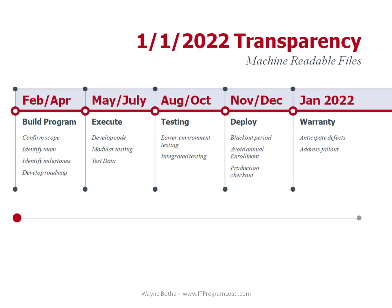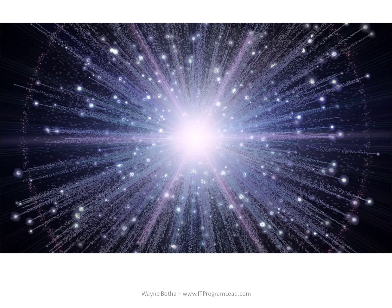For the work to be done in 2021 to reach the 01-01-2022 deliverable, here is a starting point. Initially, you must get the program established, which includes confirming the scope of work and identifying the teams to do the work. Then the code must be delivered, tested, and deployed. This is not strictly sequential — there may be sub-components of code that can be developed and tested early and then deployed into production. Try to avoid the big bang approach by putting smaller pieces of code into production during the year so that you can make incremental changes and catch defects earlier.